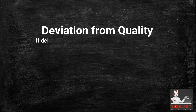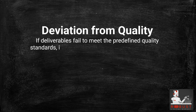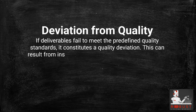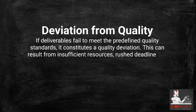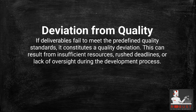Deviation from Quality: If deliverables fail to meet the predefined quality standards, it constitutes a quality deviation. This can result from insufficient resources, rushed deadlines, or lack of oversight during the development process.